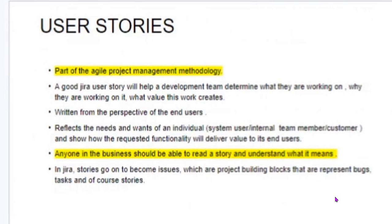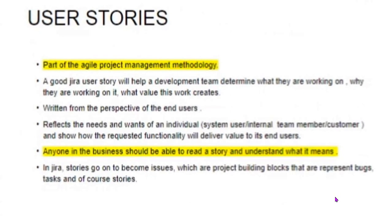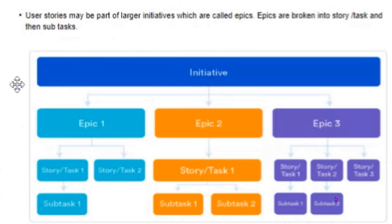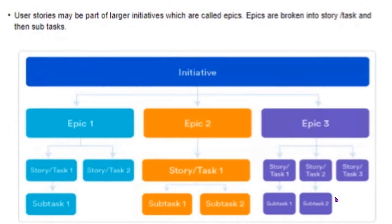In Jira, stories go on to become issues, which are project building blocks representing bugs, tags, and user stories. User stories are developed using a hierarchy: there is an initiative, and from the initiative you create Epic 1, Epic 2, Epic 3 — it can go on to several epics depending on how big the initiative is. Epics are a big chunk of work, further broken down into user stories, which are further broken down into tasks and sub-tasks.